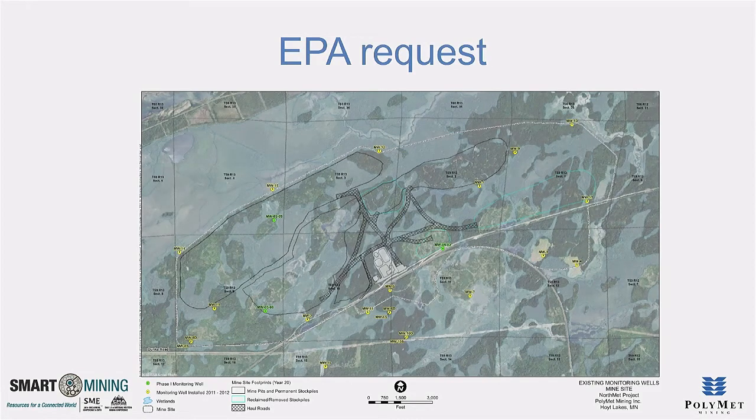So what happened is we brought in a litigation consultant. And the litigation consultant came in and assessed for us how we would do in terms of litigation with the number of wells we had. And they said, you're technically right, you're statistically right, but we don't think you're going to prevail in court. So we then actually got another consultant to help out, Andrea's team right here from Foth, and they brought in an individual who has expertise in MODFLOW and in litigation, has been litigating these issues actually in the courts, with bans and other opposition, and came in and then developed a proposal for additional wells.